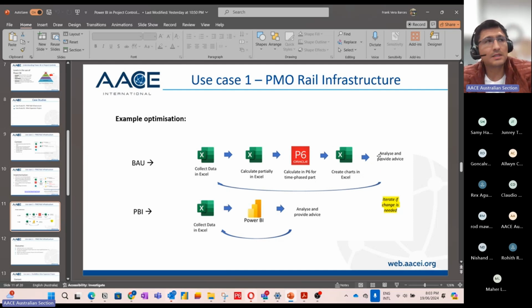What happened a lot is that you realize once you do this iteration, you realize that there is some misalignments in the reports that you have to fix. So you have to go back to the data source, do again the new process, recalculate the stuff, uploading again to P6, run P6 again, download the data again, and produce the S-curve in Excel.